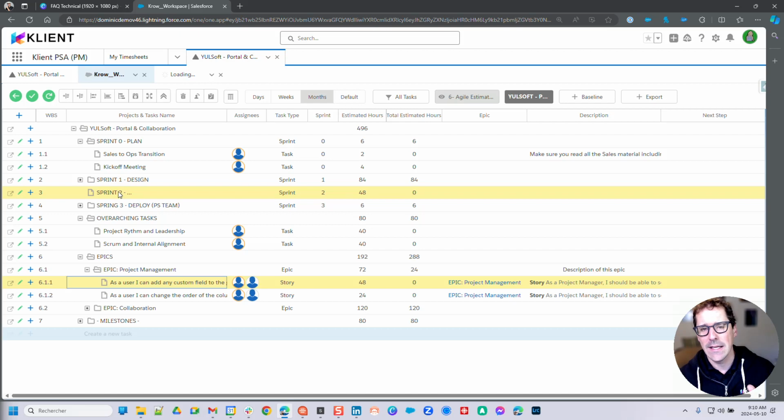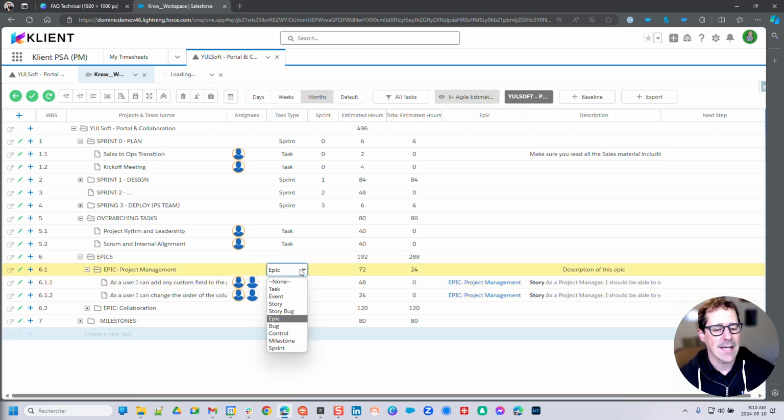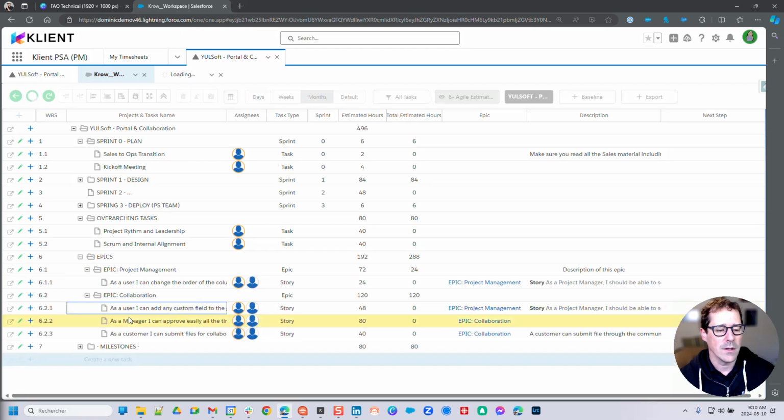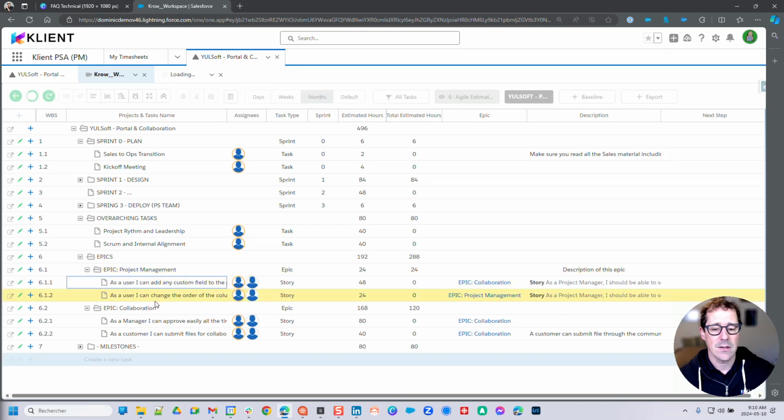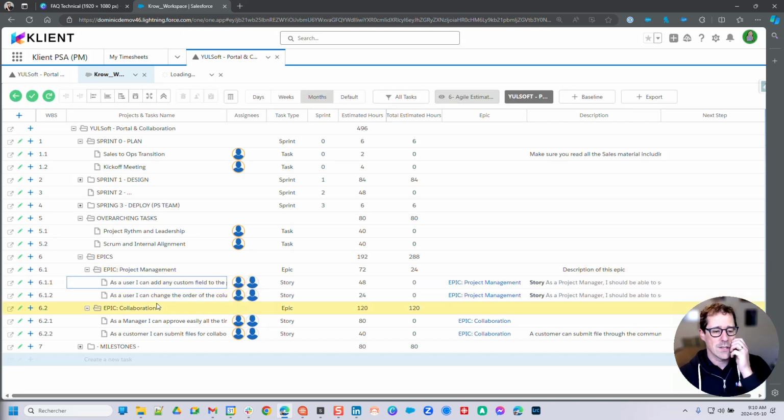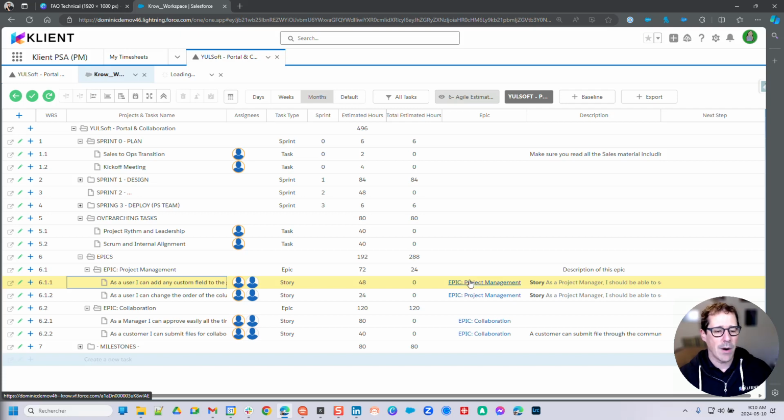It's a tiny detail, but just adding a field here, which is a lookup to an epic task, and leveraging the task type field that we have here, we can now have that relationship created. So if I drag a story within an epic or create a new one, you see that the epic gets related and stamped. I'm going to bring that back right here just so that I keep the information where it should be. So here I'm related to my project management.